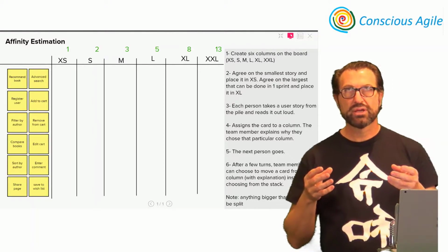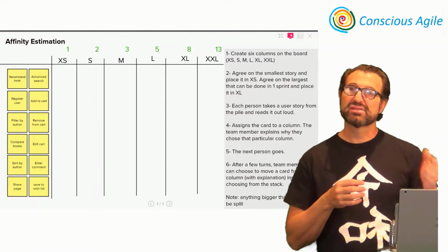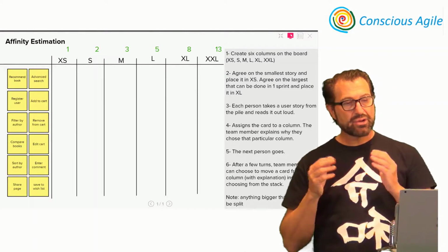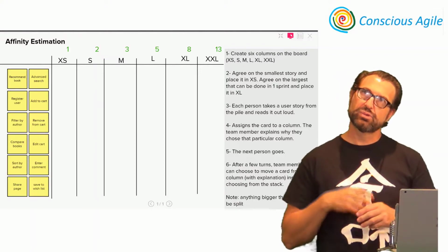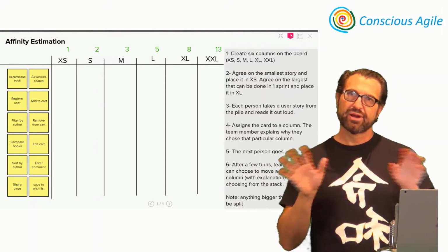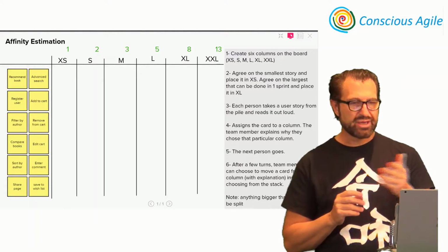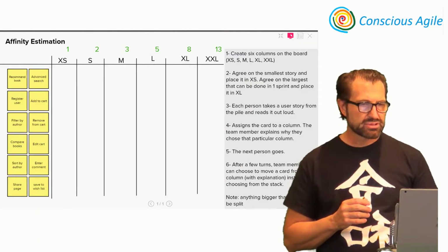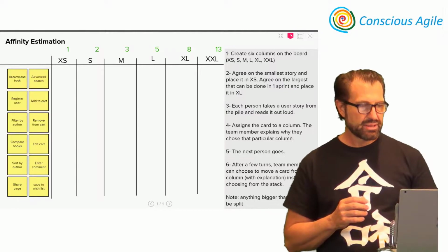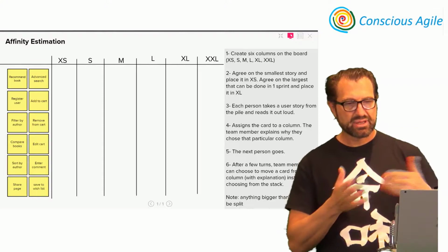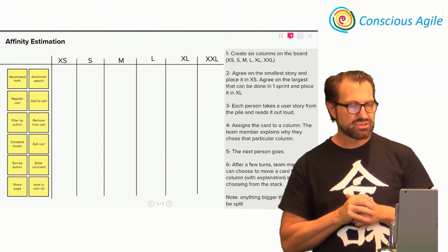Our mind gets into relative estimation much easier than if we start using numbers and saying, oh, a 3 is 3 hours or a 3 is 3 days. No, forget about that. It's purely relative estimation. That's why you can even hide the numbers on top so nobody can see them, and then the Scrum Master can translate t-shirt sizing to numbers.